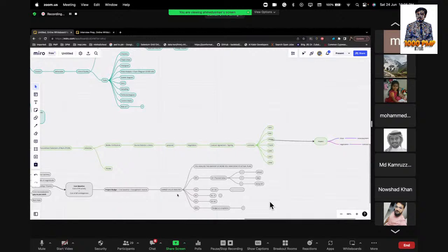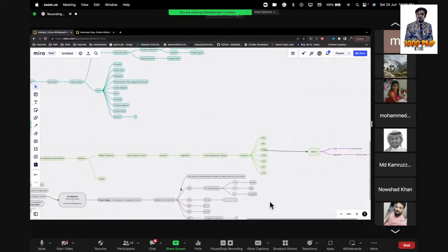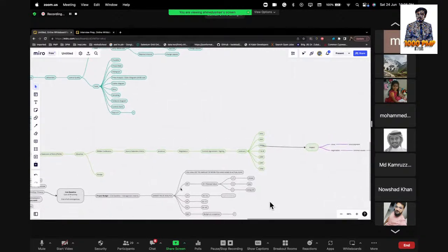The first one is SPI, and we are also calculating how you are utilizing your amount and spending your resources. For SPI, the formula is EV divided by the planned value, and the indicator states very clearly: if this value is greater than 1, it's good to go and we are ahead. Less than 1, we are bad and need to really work on it, and equal to 1 is doing okay.